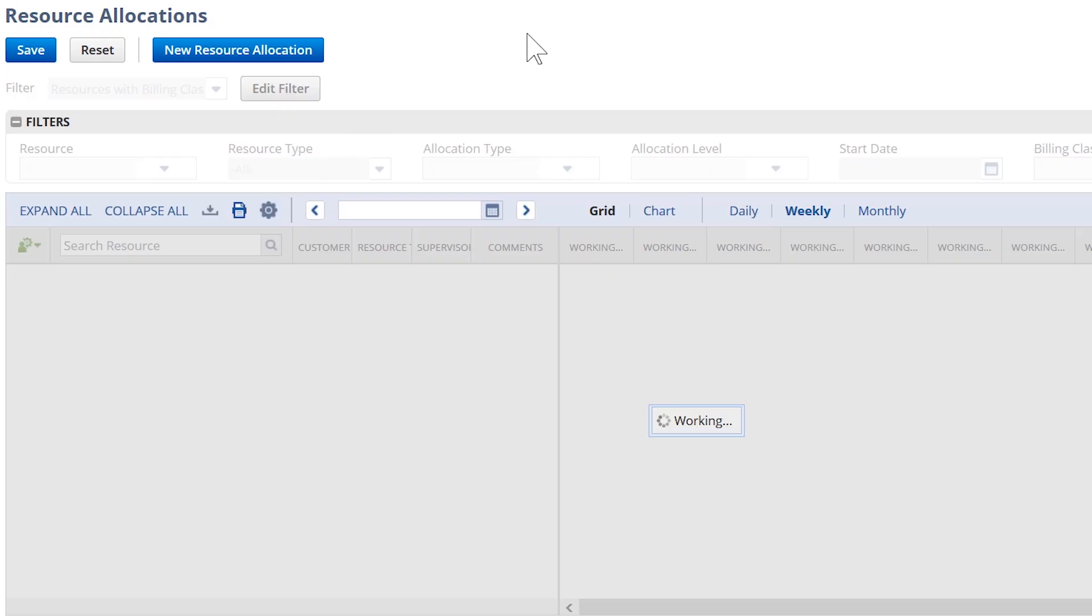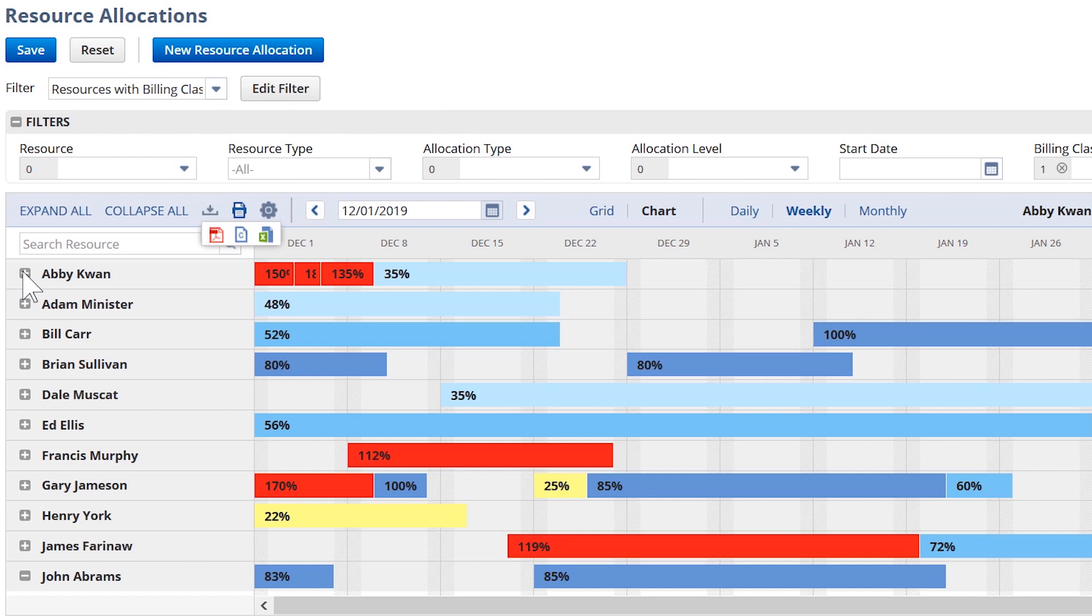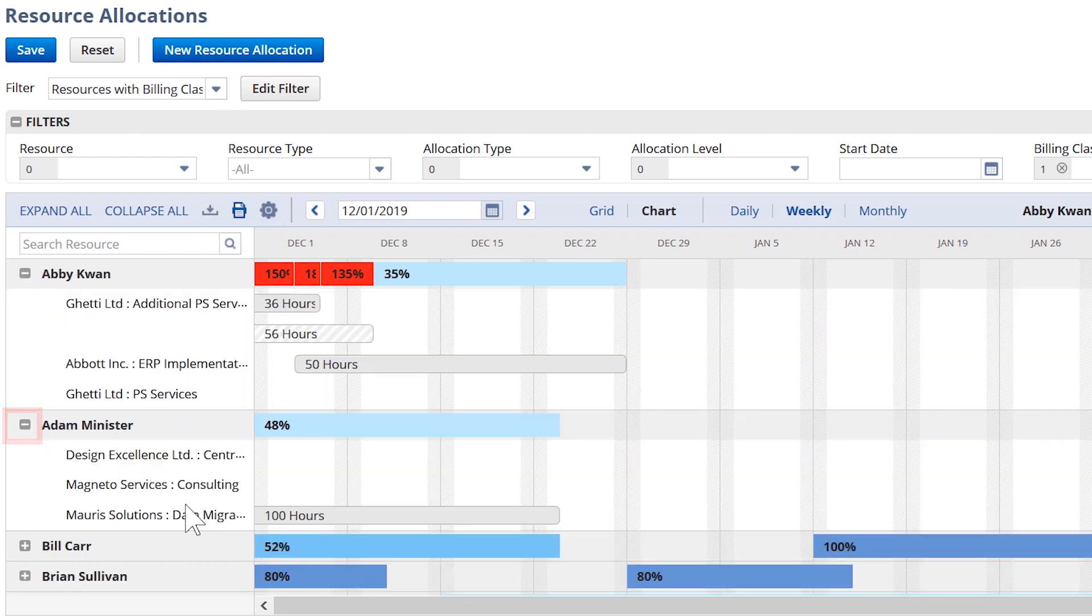We can use the resource allocation chart to look for individuals who meet the specified criteria for the project by filtering on skill sets and knowledge. This chart provides a comprehensive visual display of all of my resources, which projects they are working on, and how much of their time is spent on each of these projects.